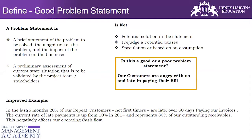Here is an improved problem statement: 'In the last six months, 20% of our repeat customers — not first-time customers — are late over 60 days paying our invoices. The current rate of late payment is up from 10% in 2014 and represents 30% of our outstanding receivables. This negatively affects our operating cash.' In this improved statement, there is a presence of four W and one H, all the key ingredients, and no potential solution or potential causes.